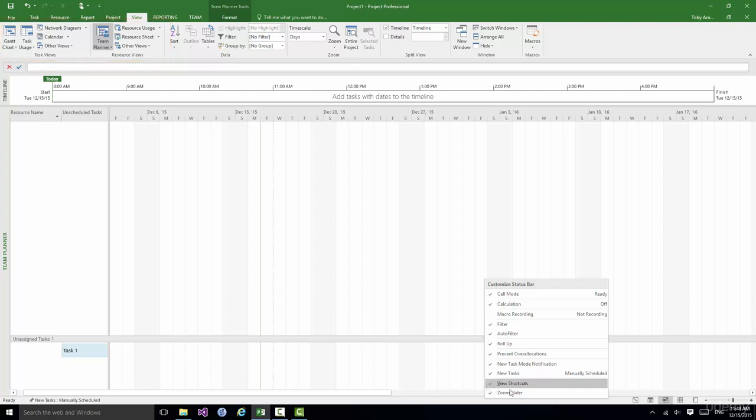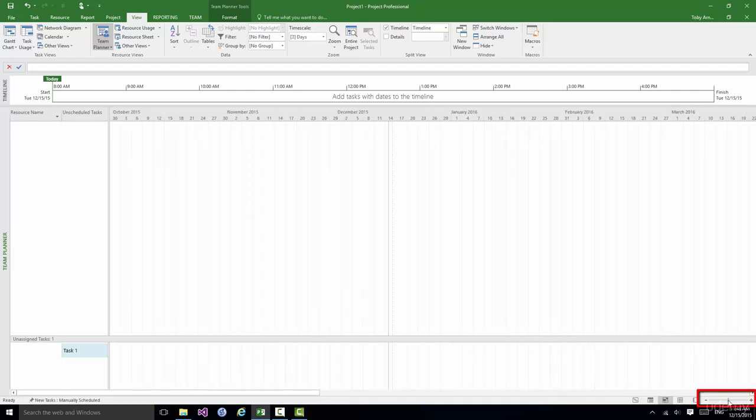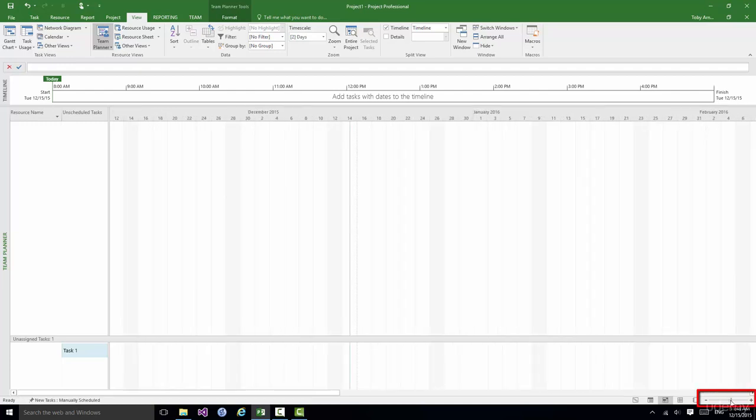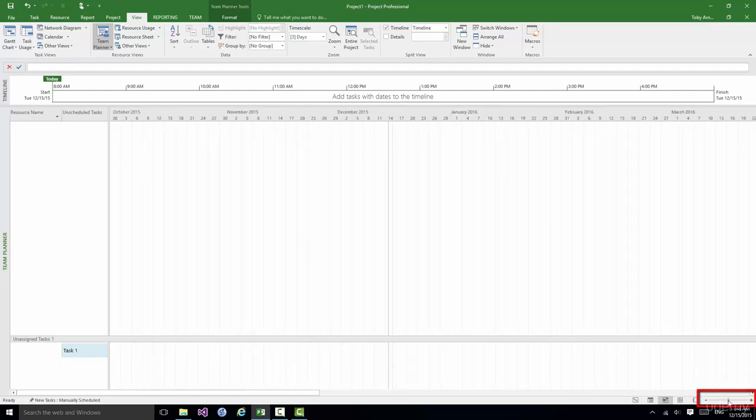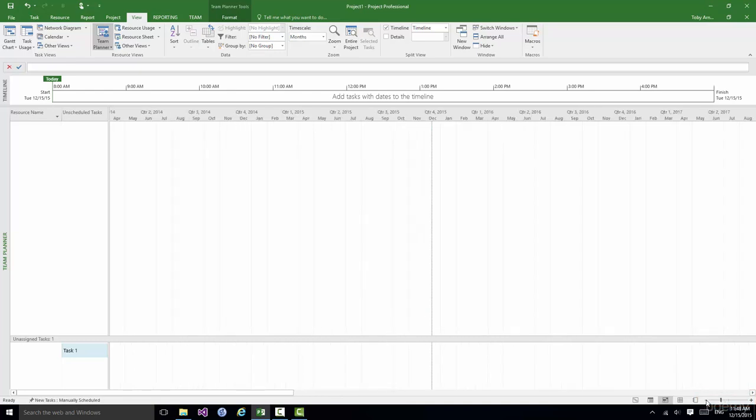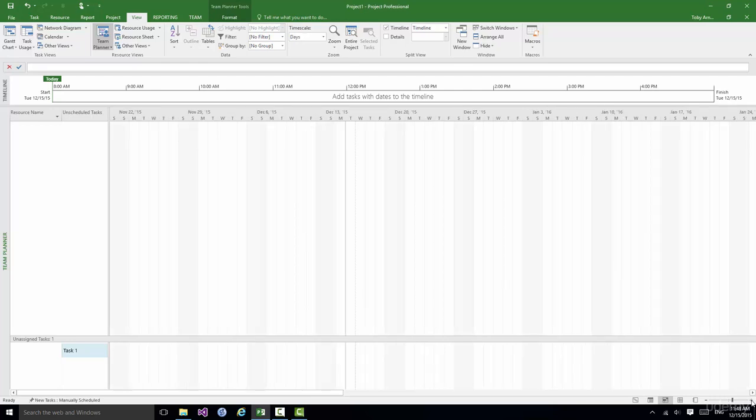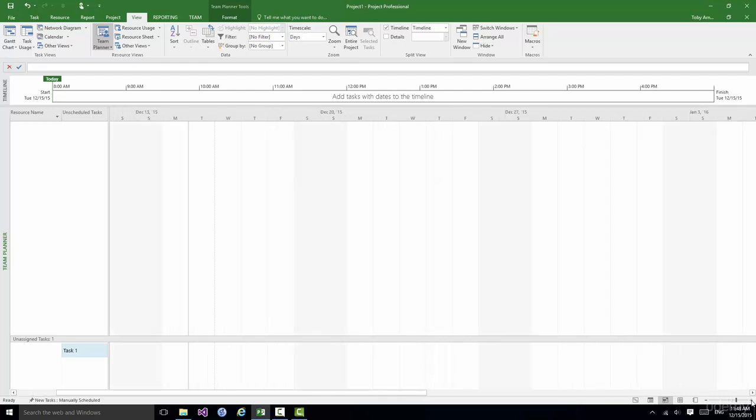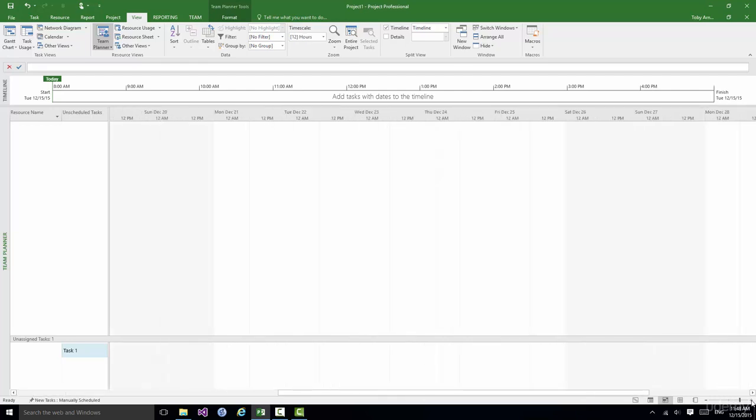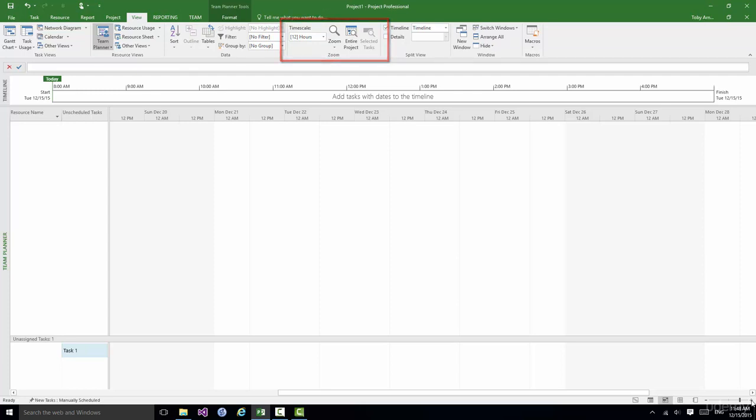The very bottom option, Zoom Slider, gives me access to this control that I can use to zoom in and out of the current view and this basically zooms by time. So as I zoom out I get a broader view of time. So now you can see in that view that I'm looking at quarters. If I zoom in by clicking on the Plus button there I'm down to months then weeks then eventually I get down to individual days. Now again I can either use that, it's quite a coarse control but I can use that, or on the View tab on the Ribbon there is a Zoom group that lets me be much more accurate and much more flexible about how much I'm zoomed in on the current view.